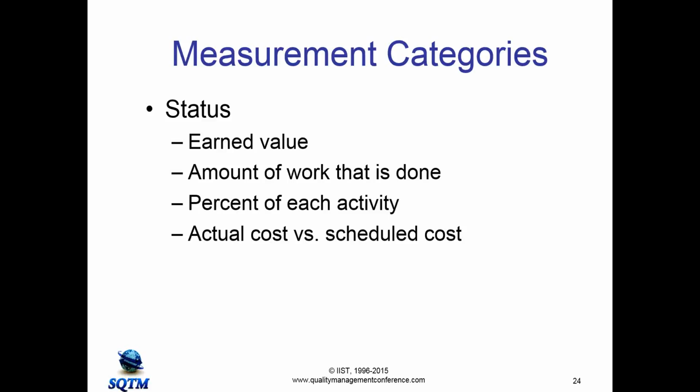And the actual cost versus schedule cost. Remember the money aspect. So you have a scheduled cost, and it could be expressed in time. And remember, time equates to dollars. So what's your schedule cost versus what is it actually costing you to do this testing? Amount of work still needing to be done. So you can say, I've done 25% of the work. Well, does that really mean that you've got 75% of the test cases still to go? Well, if you do, what percentage of the time do you have left?